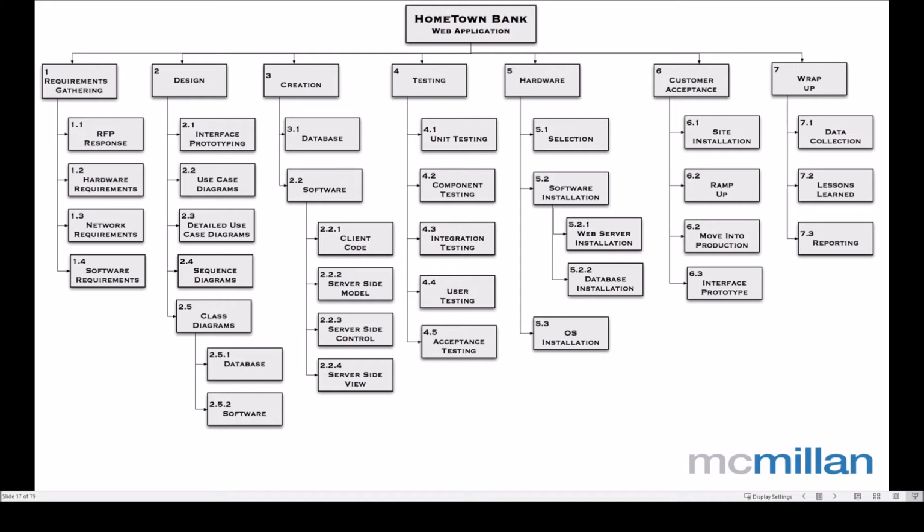So that top line, 1, 2, 3, 4, 5, 6, 7, the key activities or deliverables. We could actually put those in deliverable statements. So we're going to have some type of document for number 1 that outlines the requirements of the project. We might call it the project requirement report, a number 1 deliverable. And it's good to talk in terms of deliverables because it makes it tangible and pragmatic. It objectifies that statement, making it far more objective.